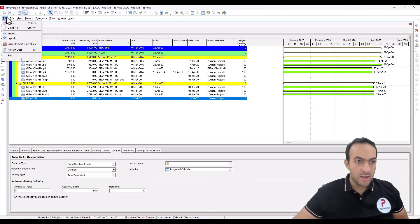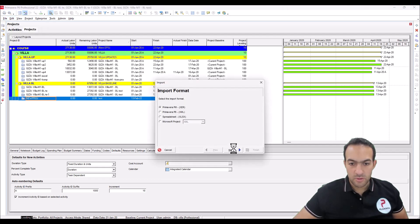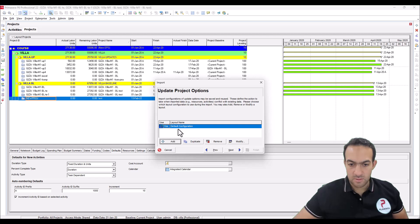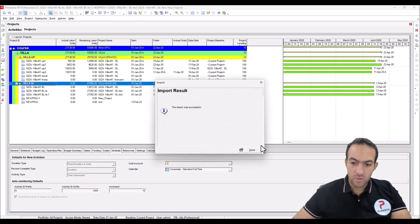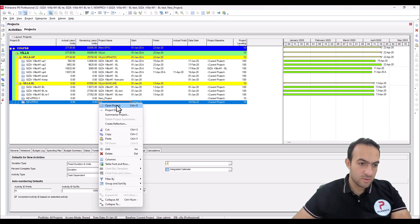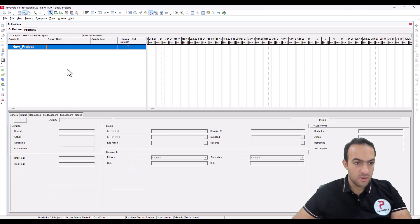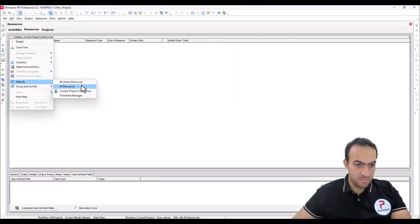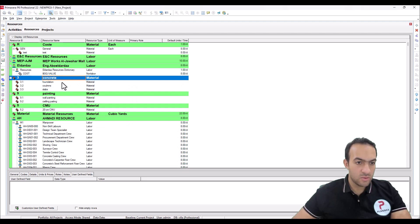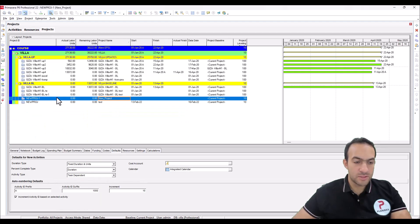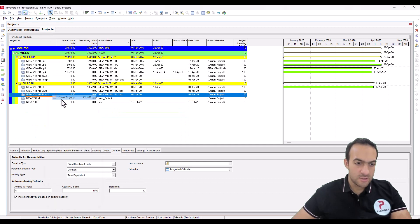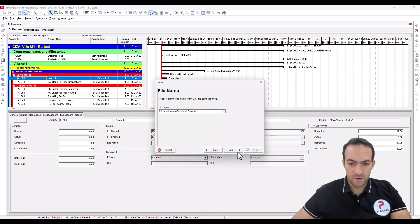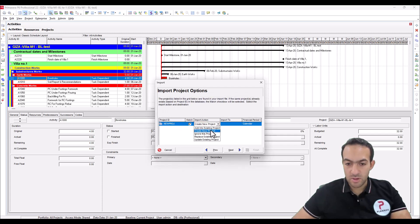Select the folder and I will write 'resource'. Let's open P6 — we have many options: import this file, import as project, create new project, enter, next, finish. In the new project there are no activities of course, but if you open the Resources and filter all resources, you will get the new items. Now, what if I want to import this resource into one of the existing projects?